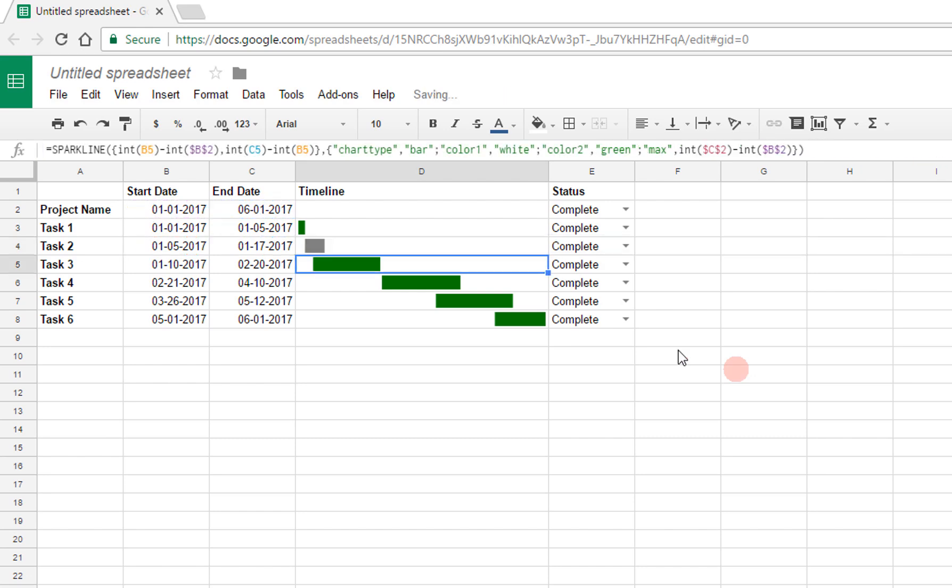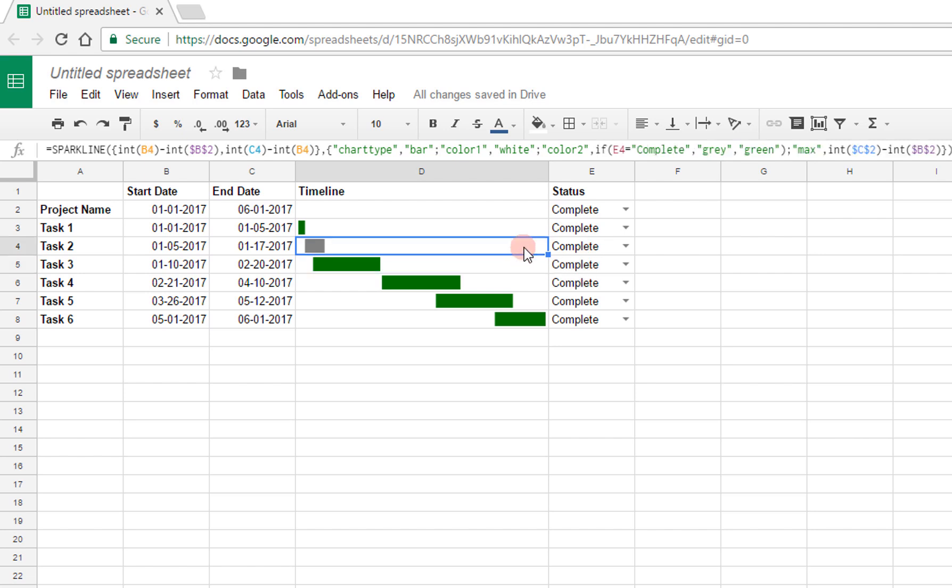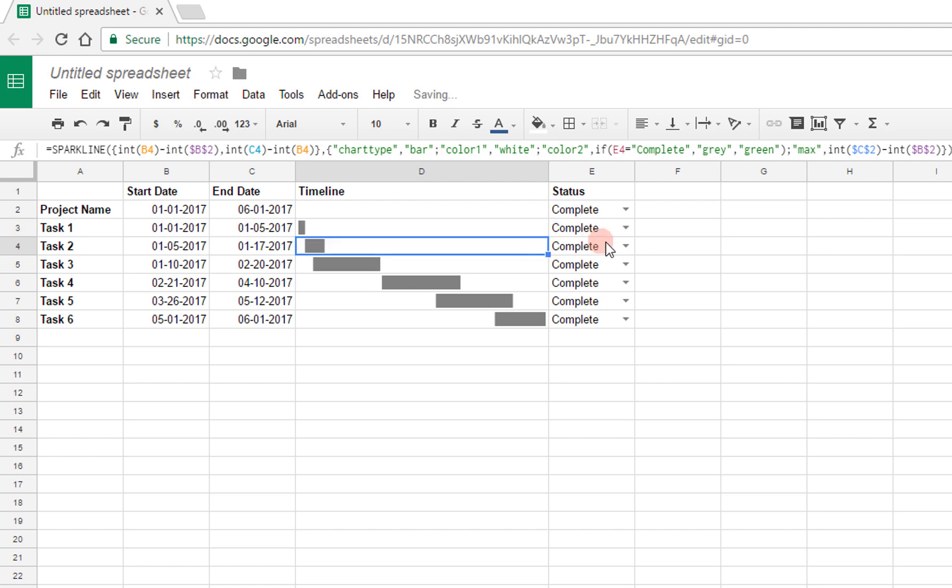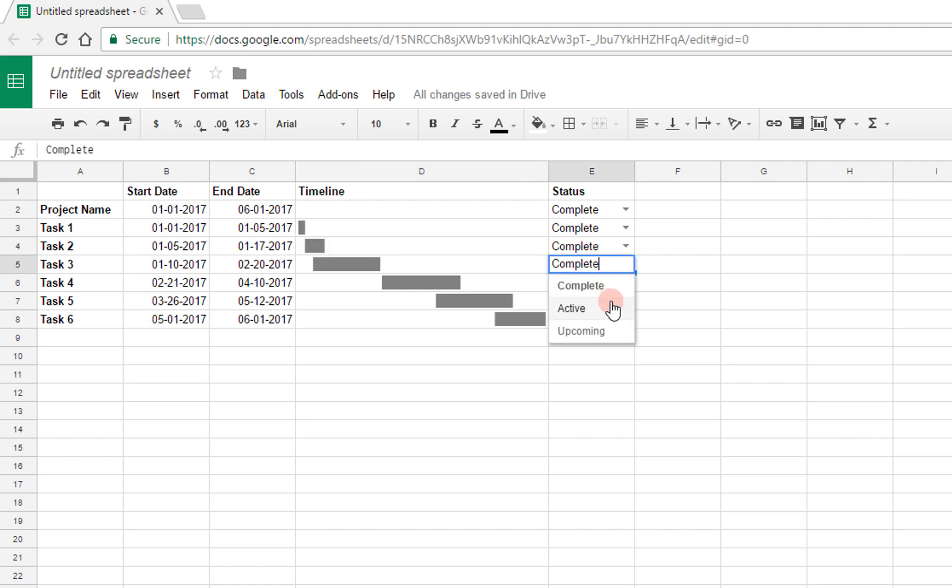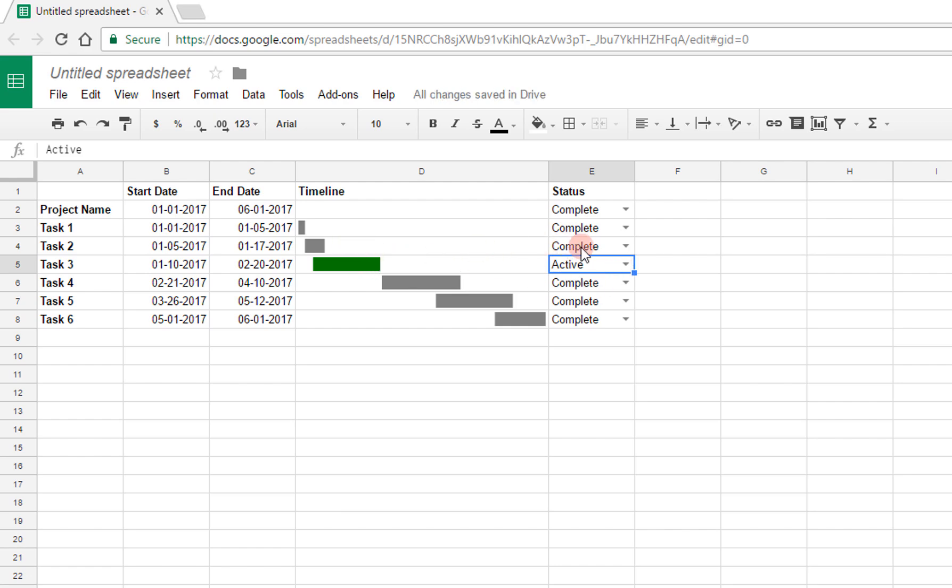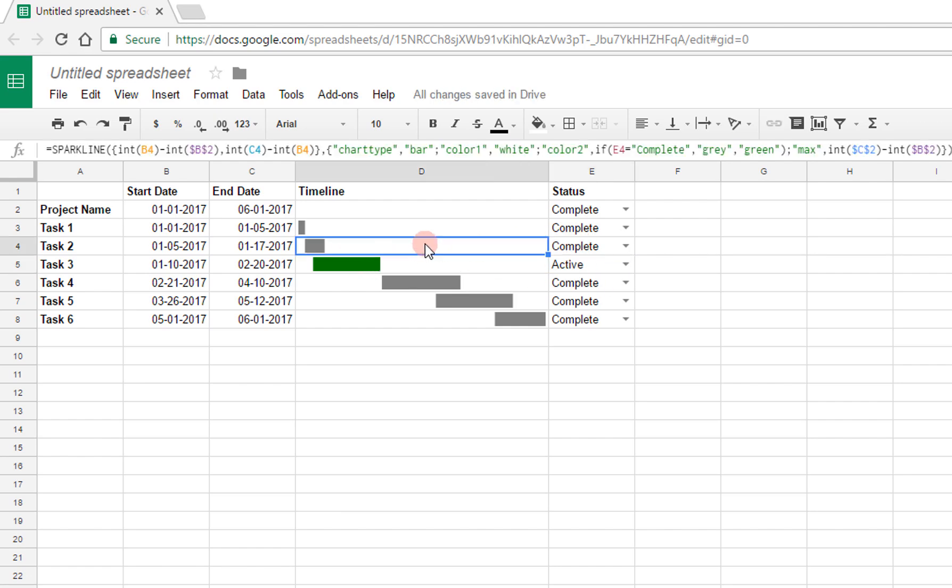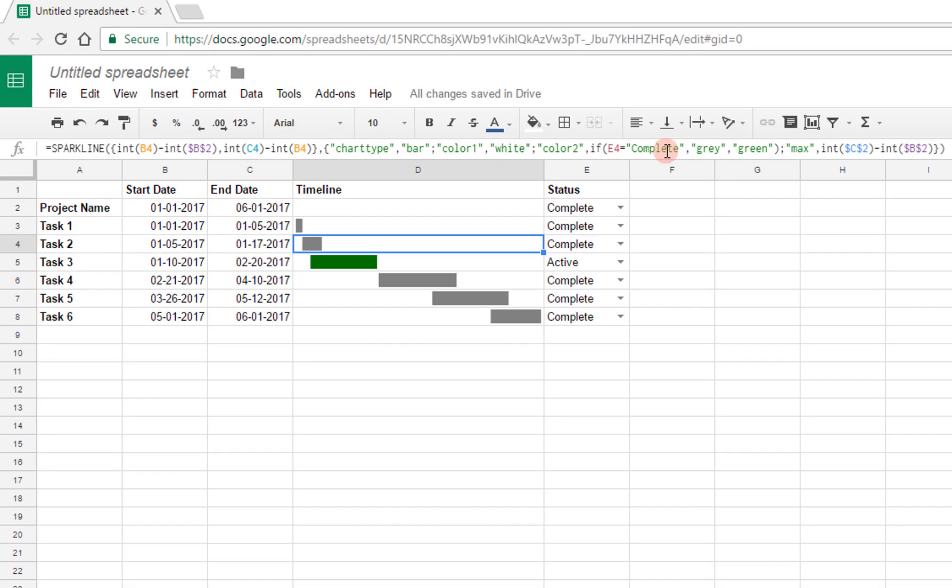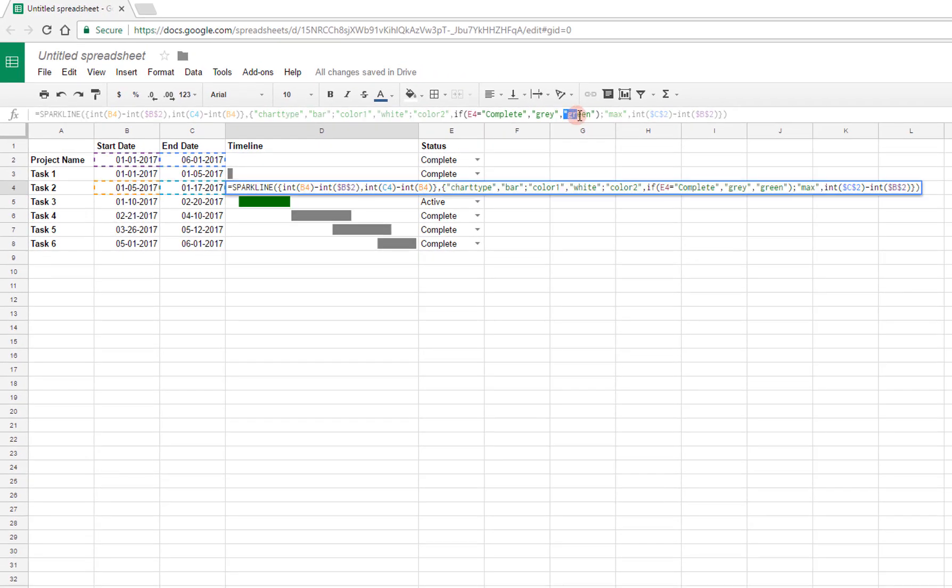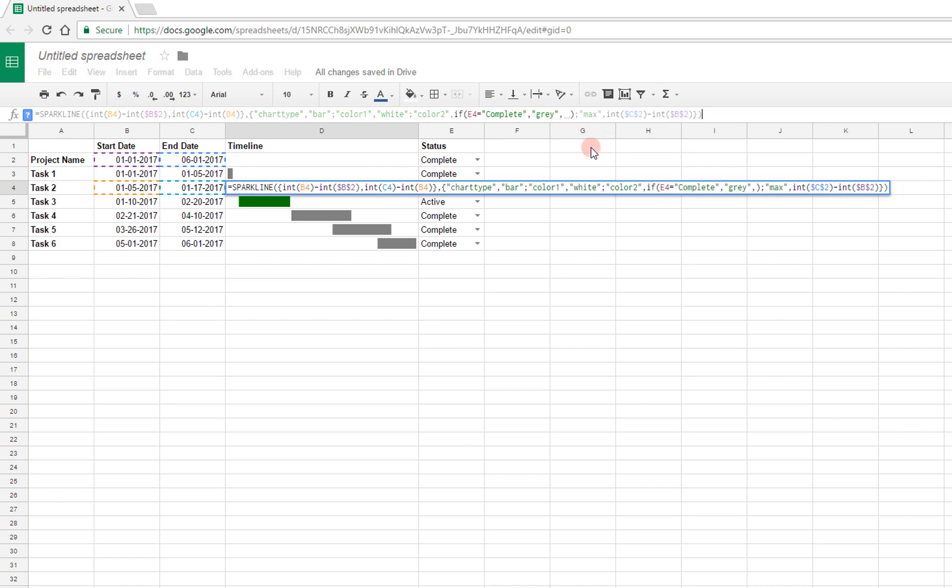And now everything that is marked as complete, as soon as I propagate this all, is going to be marked with gray. And if I change any of them to let's say active, it's going to become green. So exactly what I specified, as long as the status is complete, it's going to turn gray. But again, that's not fully what I want. So instead over here, with the else condition, I'm going to change that to another if statement, an embedded if statement. And this is where things get kind of ugly and complicated.